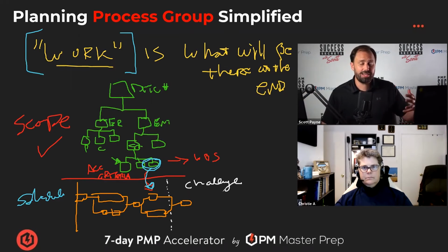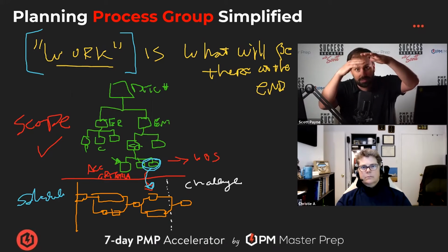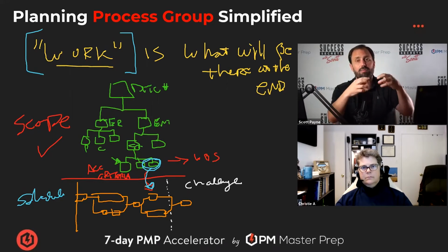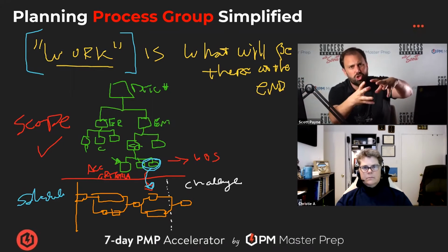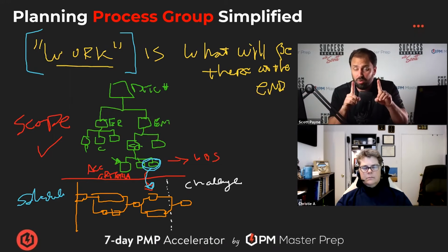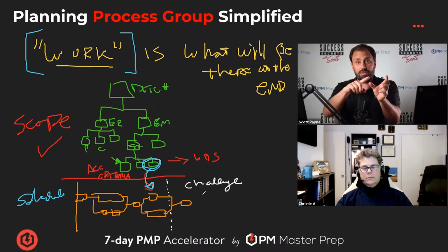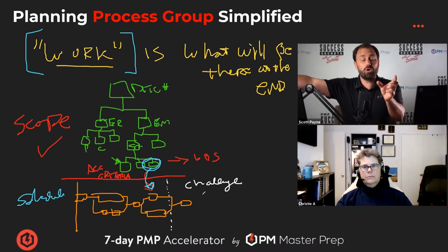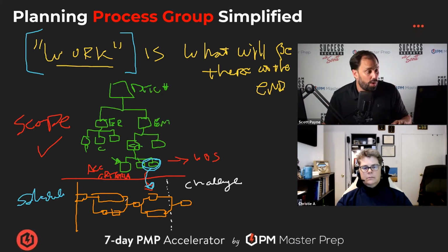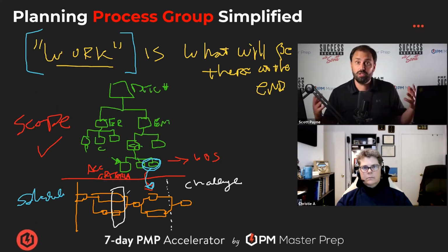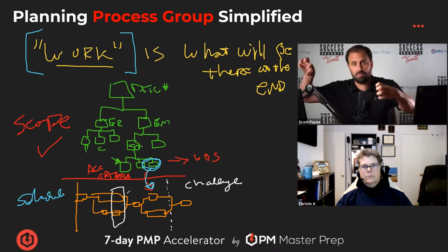This is all in these processes, the four processes that they're doing. Bring the scope down. Tell us how we're going to do it. Order it. Bring depth into it with what it's going to cost, who's going to do it, whatever. We also might go, oh shoot, the welders, they're already assigned. We're in trouble because we won't have welding capacity during this critical welding time, which is right here. Oh no. What are we going to do? Hire other welders, shift them off a job, whatever.